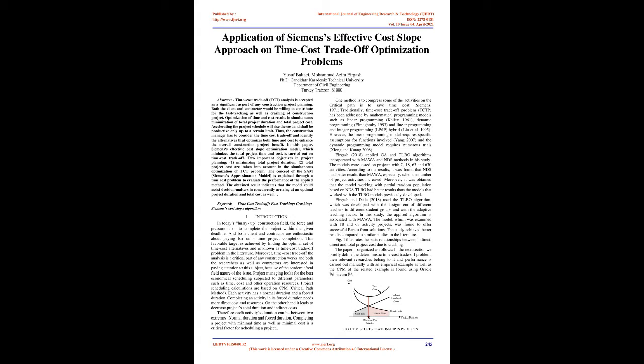Accelerating the project schedule will raise the cost and shall be productive only up to a certain limit. Thus, the construction manager has to consider the time-cost trade-off and identify the alternatives that optimize both time and cost to enhance the overall construction project benefit. In this paper, Siemens' effective cost-slope optimization model, which minimizes the total project time and cost, is carried out on time-cost trade-off — two important objectives in project planning.